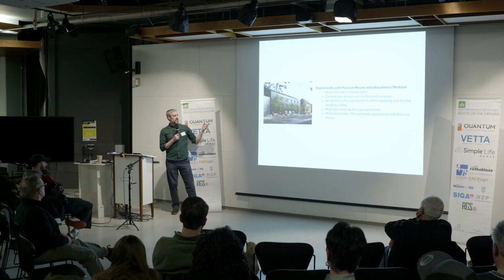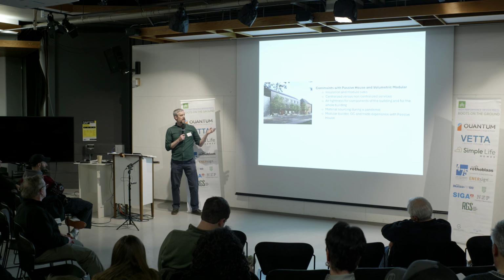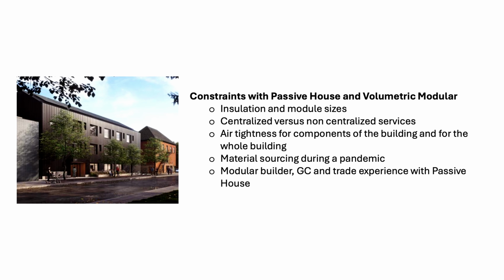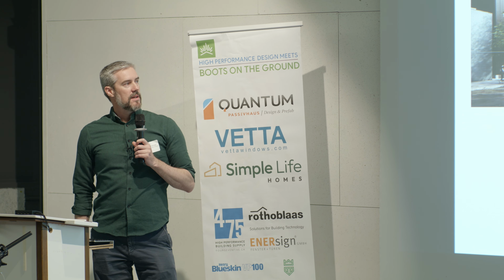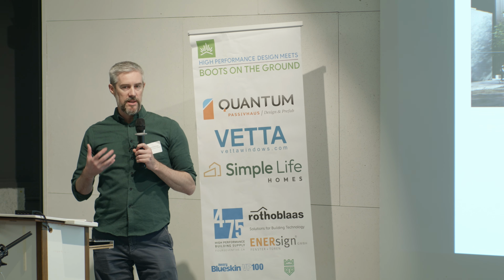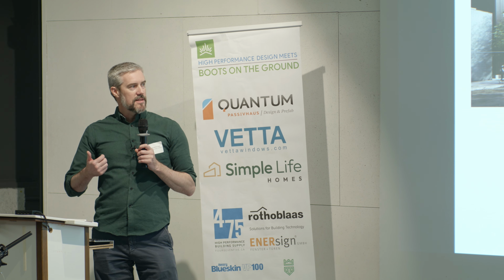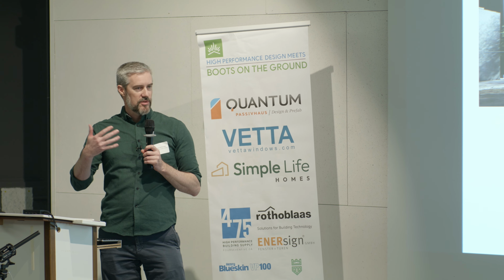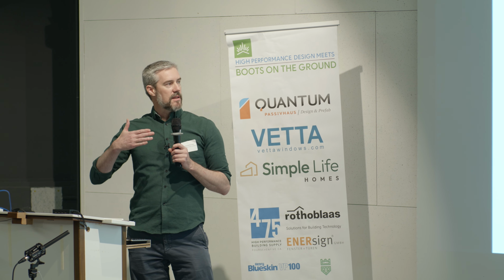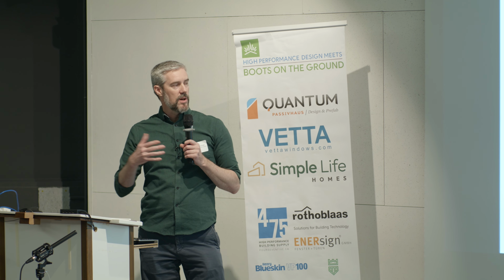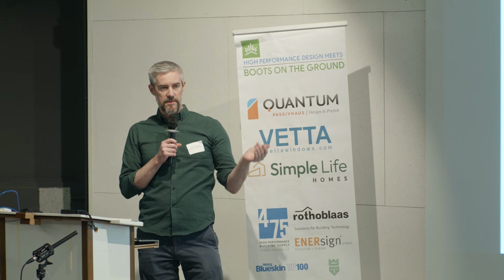And then the last major challenge was trying to find trades and the modular provider, trying to get them upskilled and get them to understand the demands of Passive House. The one thing that I keep preaching to people as I do talks like this is that in terms of build quality, it's in our standard drawings and specifications. We just weren't following through on the quality, and the contractors and trades weren't following through on the quality necessary for Passive House to achieve certification.